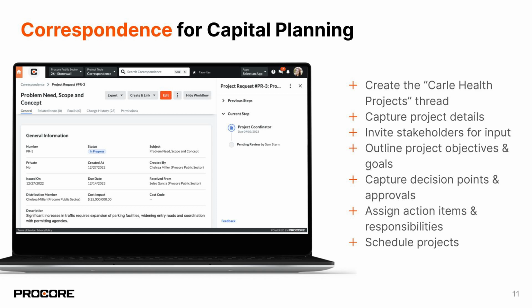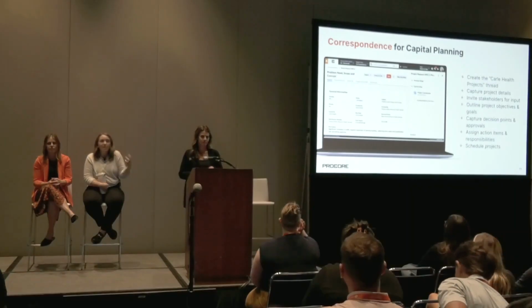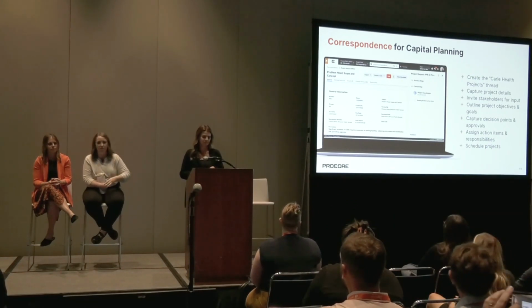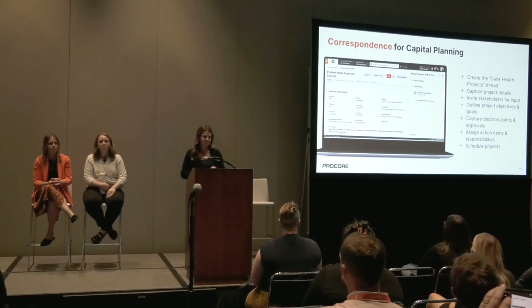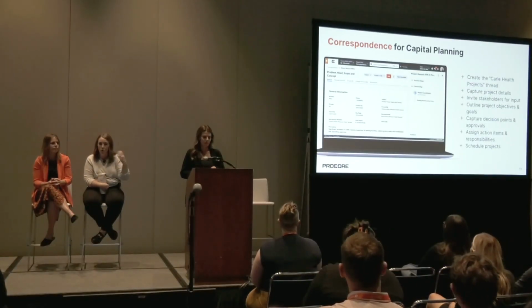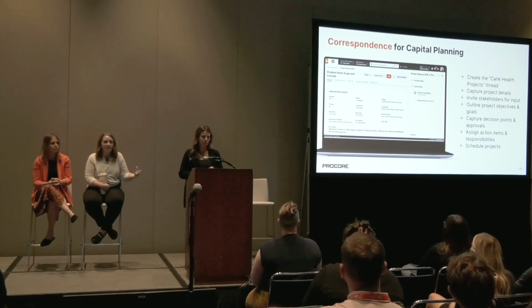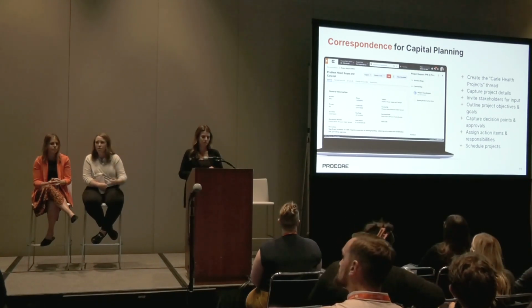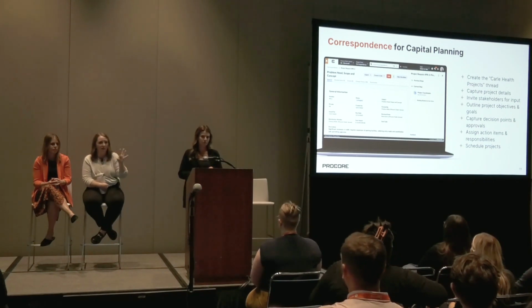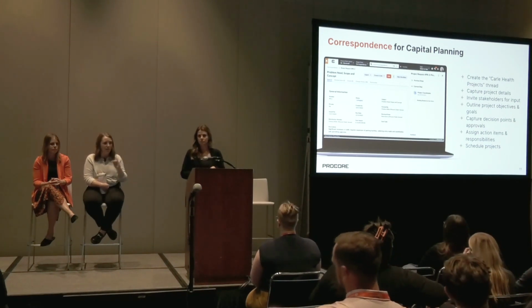So the overview includes like, what region is this project for? How did you receive the project? Who asked for the project? What's their VP's name? What capital pillars does this apply to that deal with Carle Health? And then project specific stuff, right? Like questions about, what drawings have you done so far? What's in scope? What is the person asking for? And then financials. So the financial piece says, is this going to be a regular project, or is this going to be housed under one of our small facilities refresh type projects?